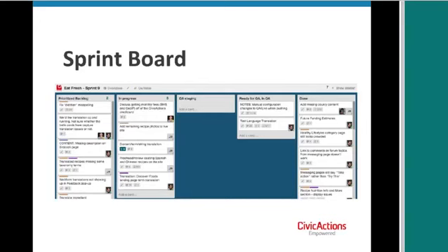So that can be a meeting every week. That is the product owner and the team looking at the top priority items in the backlog and making sure that they're fixed up and ready for the next sprint. And I have to say that is something that our teams have not really done a lot of thought on, the backlog grooming part of things, but we need to deepen our practice in that area.